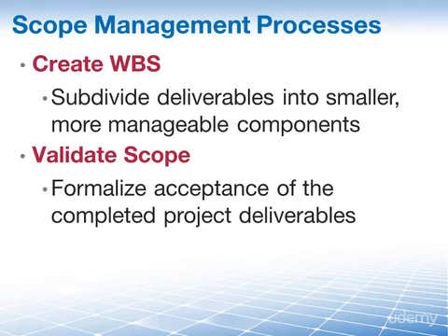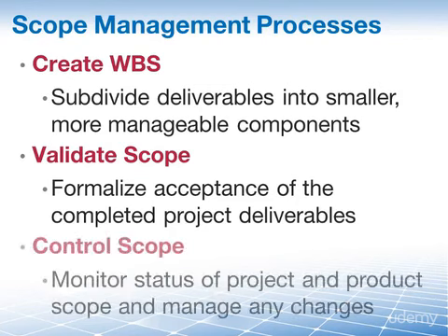Here we just create the WBS, we then hand it off to the executing processes where it gets created, and then at some point it comes back here to the validate scope process, the process of formalizing acceptance of the completed project deliverables. And our biggest problem on every single project is scope creep. So the process of control scope was inserted to help us deal with that.